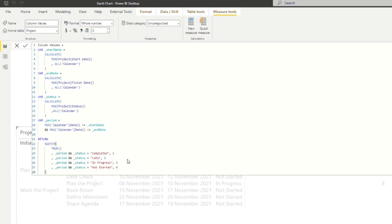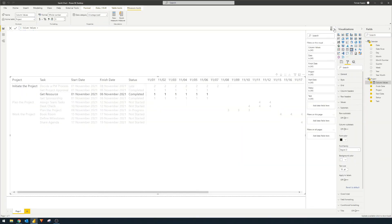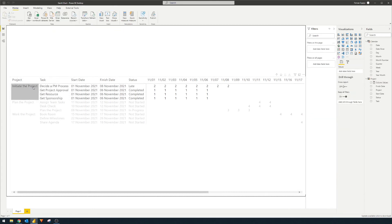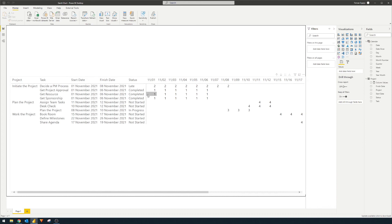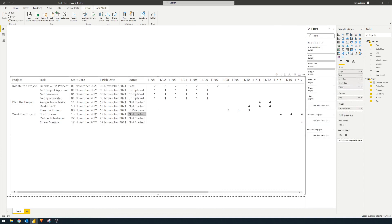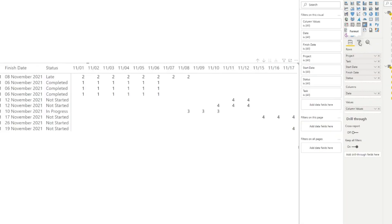Let's see if that works. So here we go. So now if I just deselect that for a second, so you will see now that if it's late, for example, this task is late, you will see that the number on our value is two. If it's completed is one. If it's not started, it's four. And if it is in progress, it is three. So very simple, right? So now that we've marked where the periods are for each of the tasks, and what their status are, now we move on to the cool stuff, which is the conditional formatting.